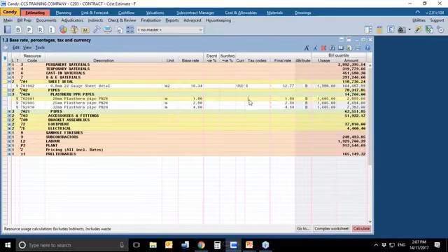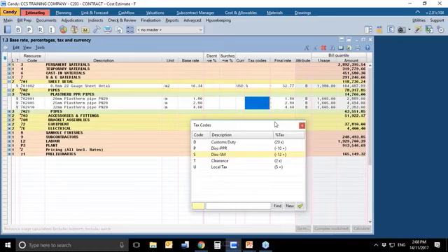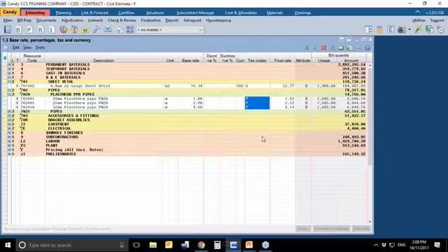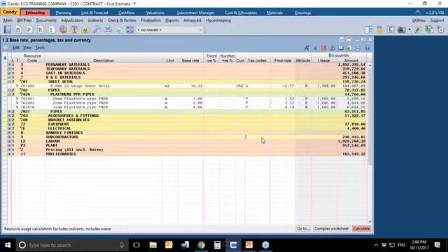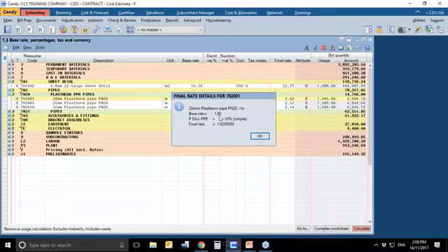And here, then I could go and across a range of resources, I could right click, allocate the tax code. And here, this is the discount on PPR pipes. So there is my rate, 1.62. I'm buying at 1.8 dirhams per meter, less than 10% discount. The final rate works out to be 1.62.